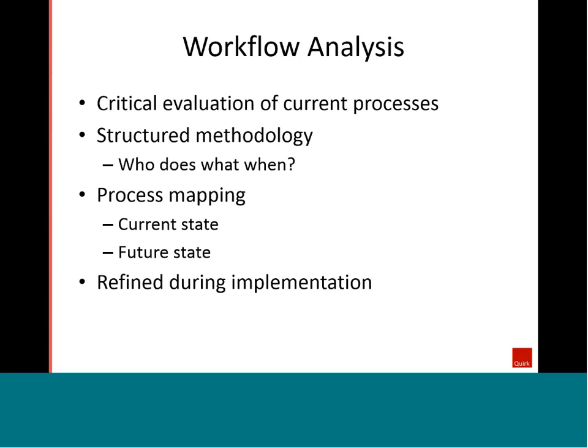The other really important thing that oftentimes gets overlooked in project planning is contingency planning. Nobody wants to think about a project failing, but unfortunately, the statistics on IT-oriented projects are really alarming. 7 out of 10 IT-oriented projects tend to either fail entirely or are over budget or delayed. And part of that reason can be attributed to the fact that there isn't a contingency plan in place.